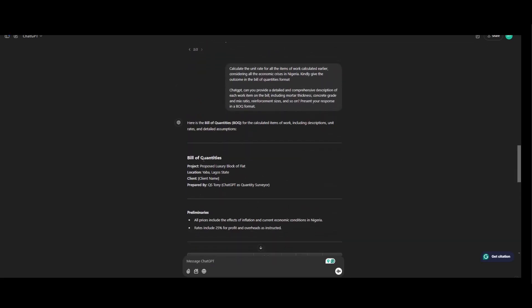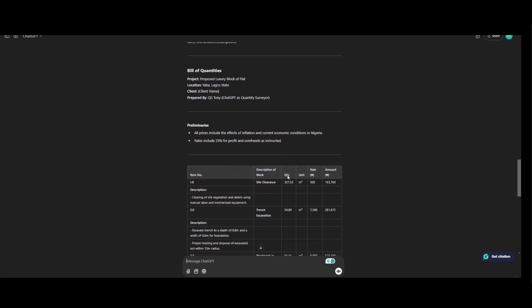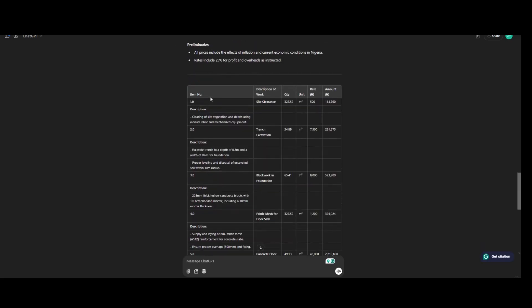Okay, starting from here. So bill of quantities. Project proposed luxury block of flat. Location here by Lagos State. The client's name is Richard. Prepared by QS Tony. This is one of my previous works. ChatGPT as a quantity surveyor. Preliminaries upright include the effect of inflation and current economic conditions in Nigeria. Rate including 5% for profit and overhead as instructed.